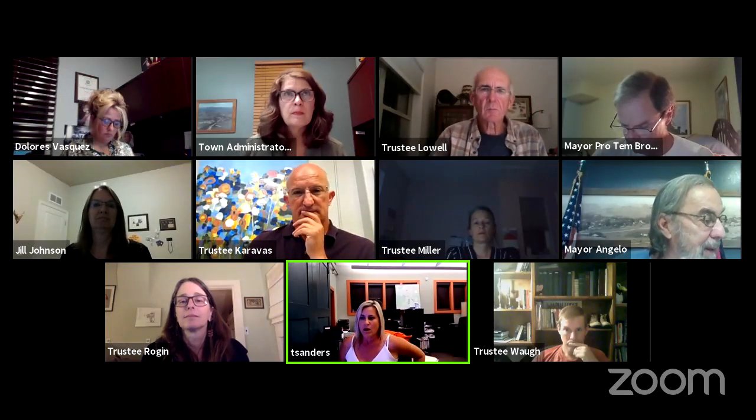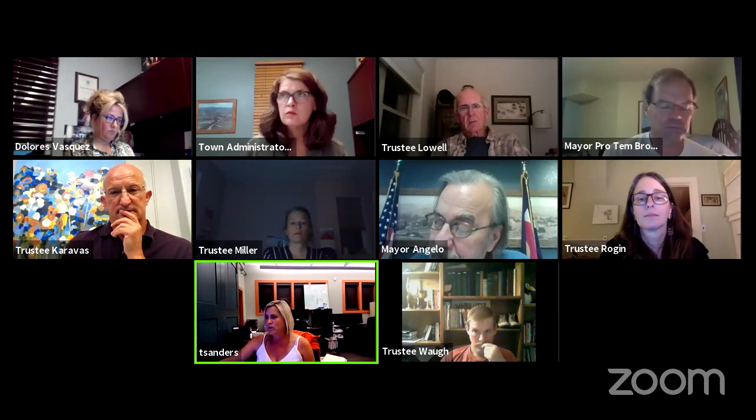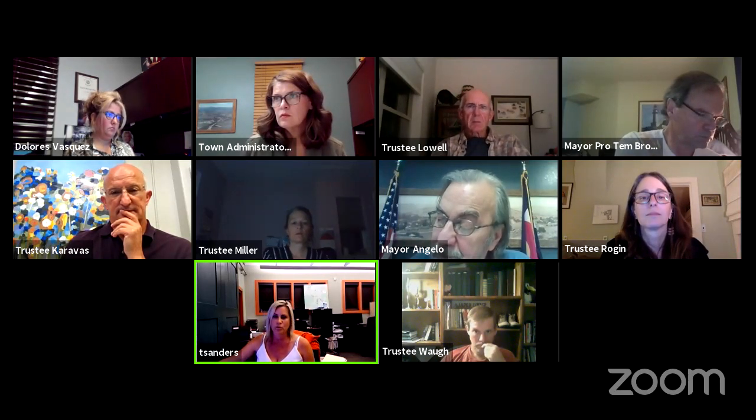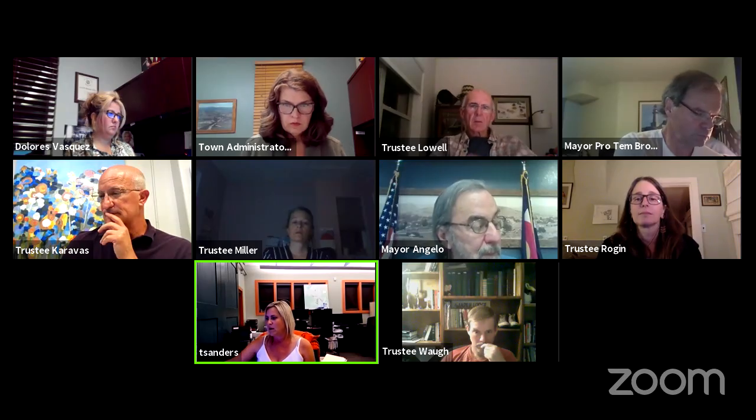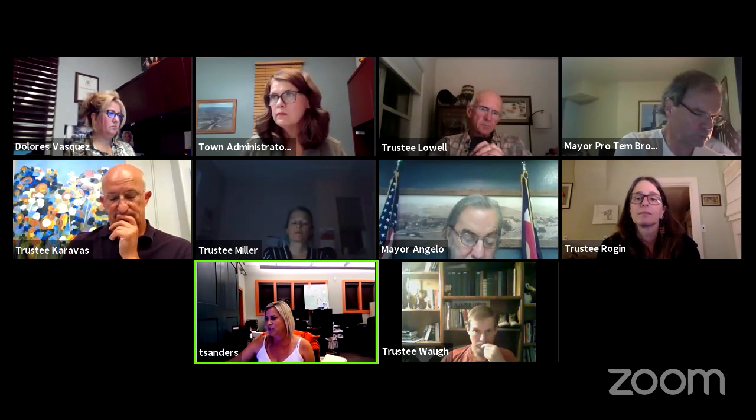Evening, everybody. I'm not going to read through the report, but I had a few highlights. Wanted to mention that Bone Park Phase 2 is substantially complete. So they are working on final cleanup and punch list items. I spoke with the project manager with the contractor today, and he felt like everything should be completed by the end of the week. And then we'll have to do normal closeout documentation for that project.